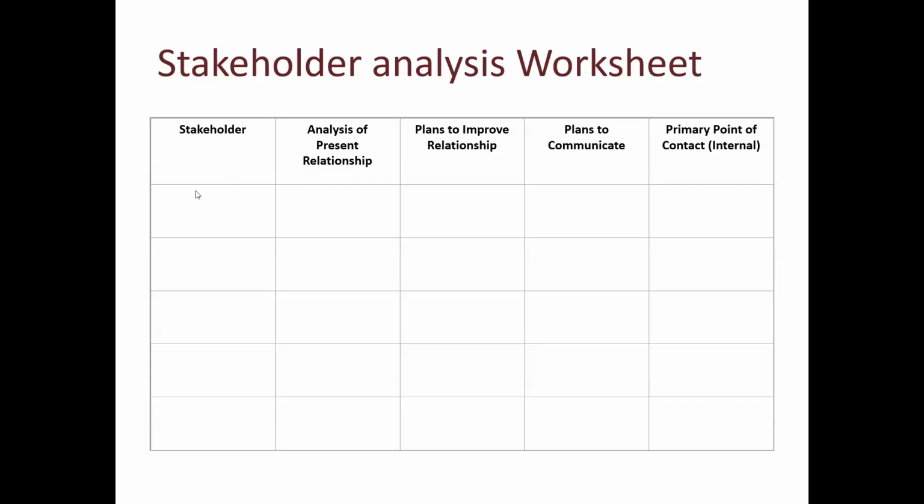We get an interview or meeting with each one to understand whether they are supportive, neutral, or against, and why, then the communication channels, and if it's more than one, we ask about the best one. Once you repeat this with each stakeholder, you finally get a completed stakeholder analysis worksheet. Before going any extra mile, you need to make sure that there are no resistant stakeholders and any resistance has been dealt with, whether through you or through the champion.